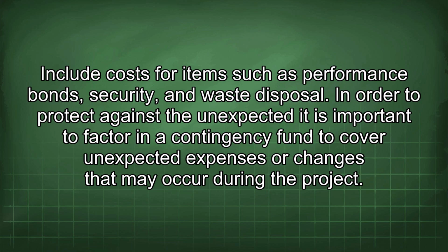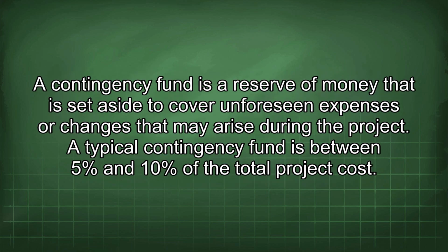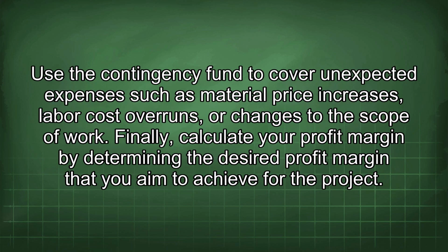In order to protect against the unexpected, it is important to factor in a contingency fund to cover unexpected expenses or changes that may occur during the project. A contingency fund is a reserve of money that is set aside to cover unforeseen expenses or changes that may arise during the project. A typical contingency fund is between 5% and 10% of the total project cost. Use the contingency fund to cover unexpected expenses such as material price increases, labor cost overruns, or changes to the